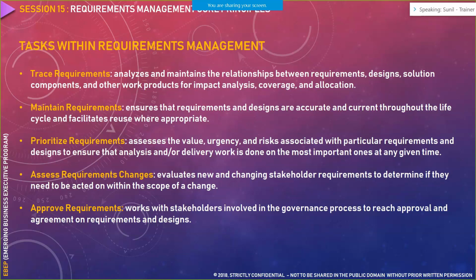Apart from that, governance can also be established through the statuses of that particular requirement. For example, requirements writing in progress, or requirement gathering in progress, requirement completed, approval in progress, requirements approved, requirements ready for development. So these are typical statuses that a specific requirement goes through in a requirement management tool.